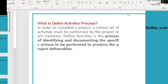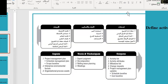Work packages are broken down into activities to be better estimated, scheduled, monitored, and managed. Work packages show small deliverables or work that needs to be completed, but activities are small parts of each work package. The work package is completed by completing all its activities. Breaking down work packages into activities gives more accurate estimation, managing, and coordination. Each activity is very small, like installing a PC or developing a sample screen. For inputs, we have the project management plan (schedule management plan and scope baseline), enterprise environmental factors, and organizational process assets.